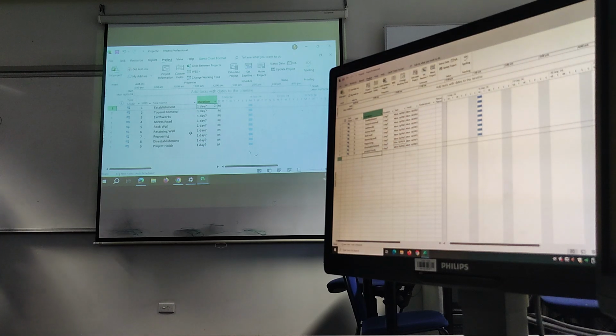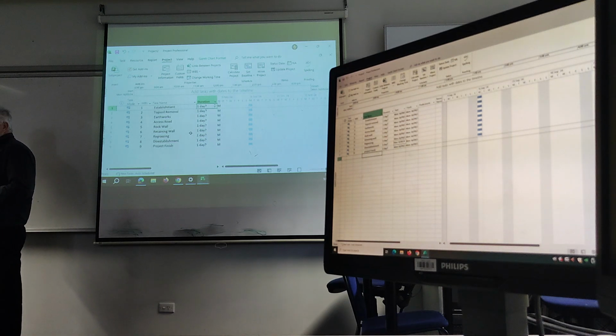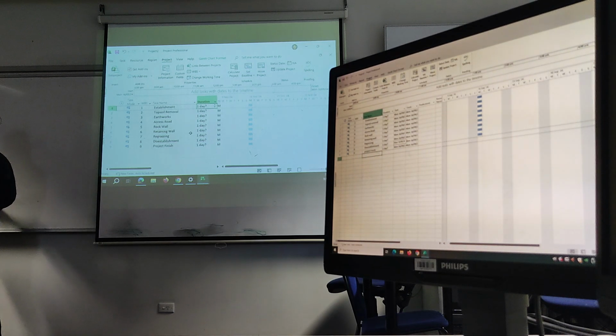Okay, so that's time, by the way. So the duration equals 75 hours divided by 8 hours per day. Which is what? 1.375, so round up to 10. Is that how it works? Yep. 9.375, 9.4 hours. Days.